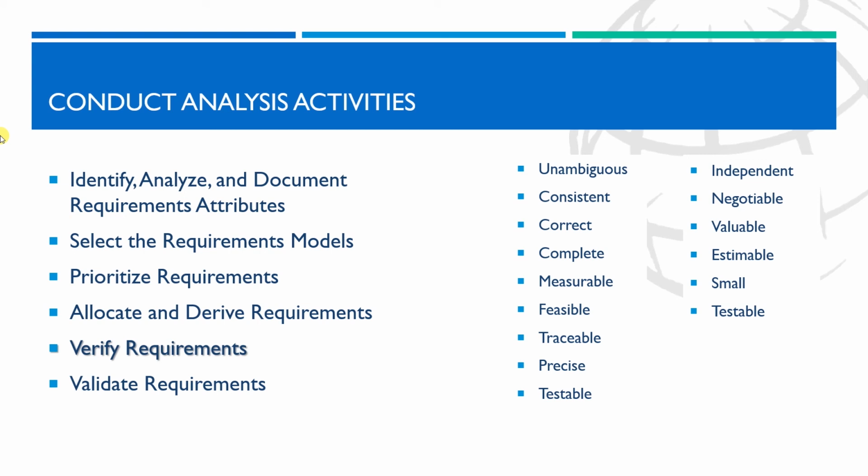Validation is a process used to evaluate that all requirements accurately reflect the intent of the stakeholder, thereby ensuring requirements meet the stakeholder expectations. Validation is typically performed by conducting a walkthrough of the requirements with the stakeholder to confirm the requirements as stated are valid and will deliver the anticipated value.